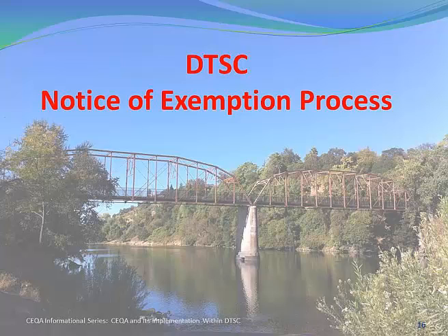We probably will, in many instances, be able to do something that we might call an environmental assessment, or it might have another name. But the bottom line is we're going to need to look at those same categories of environmental media and impacts in that analytical document as we look at those differences between the new permit request and the old permit, and also as that permit was modified over time.